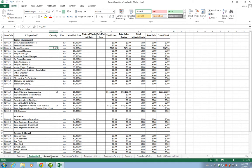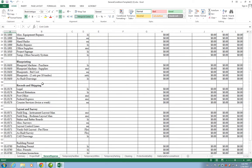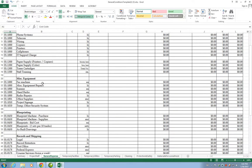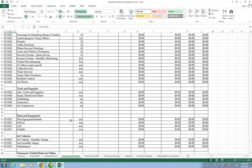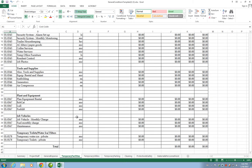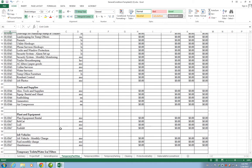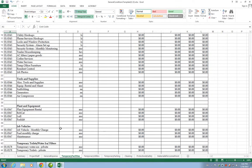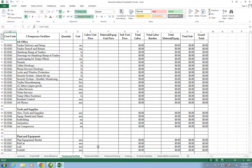Then we have general expenses: computers, telephones, printers, whatever you think that may be required to have on a job site in order to complete the work. Temporary facilities, same thing, you need to protect the job site against people wandering inside the job site. You do need to have at least a temporary barricade or temporary fence or some sort of a protection. You will enter that in the appropriate section. Here we have water, job photos, different items that may be required.